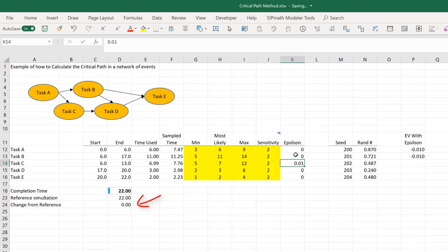And this one didn't change. When I reduced the time for task C, it didn't change. Let's record that.